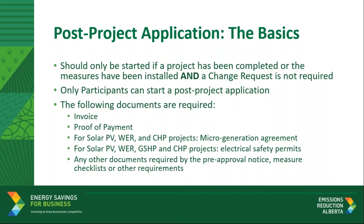Myron, when should participants start a post-project application? Participants can start working on their post-project application if they do not have to submit a change request. They should also only start their post-project application after the project has been completed or the measure has been installed. For post-project applications, the participant must initiate the process, but similar to the pre-project application, the contractor will be able to assist them with adding necessary information and documentation. For the post-project applications, we require all applications to include a relevant invoice, proof of payment, and any other documents outlined by the pre-approval notice, the measure checklist, or the terms and conditions. For example, if you had a solar PV, CHP, or waste energy recovery project, you would need to provide the micro-generation agreement, and for certain projects such as ground source heat pumps, CHP, or solar PV, you would also need to provide electrical safety permits.